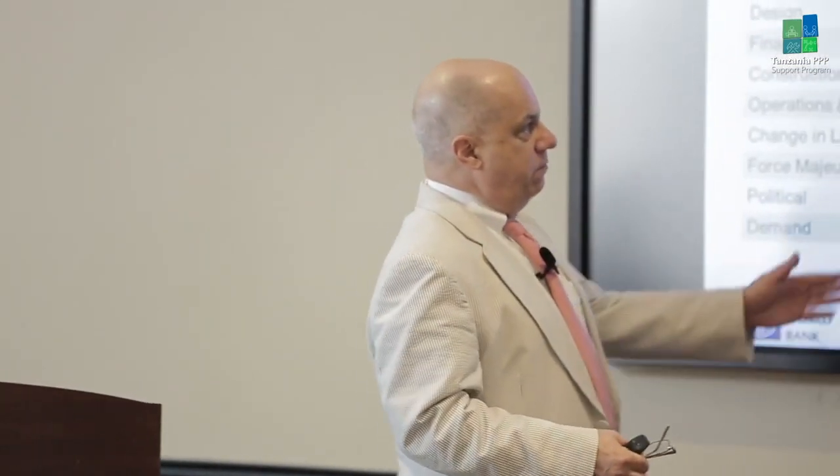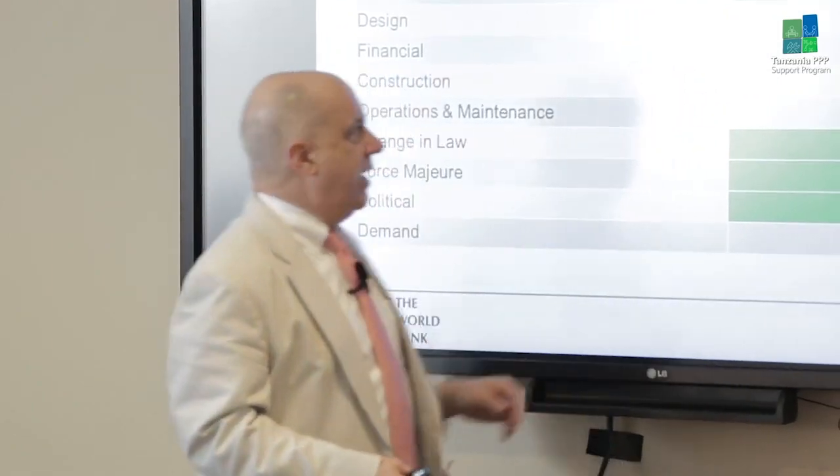We had to come up with an implementation plan. We essentially said, okay, these are the things that we're going to need to do. Again, some of this probably looks familiar to you. So spend maybe up to 4 months on the identification and screening of the project, which we actually did within that time frame. Building the business case is essentially the feasibility work that still is not completed. We took an initial crack at allocating risk for the project. Government would take on these risks, private would take on these risks.